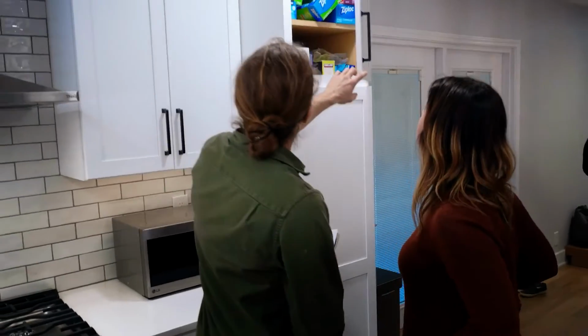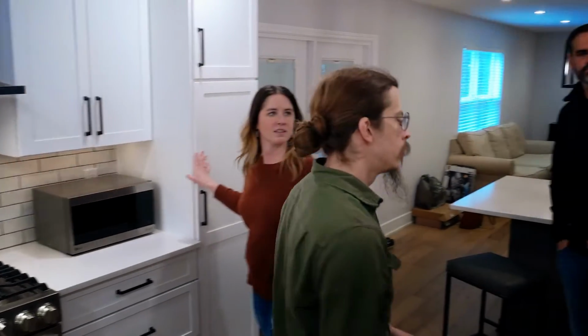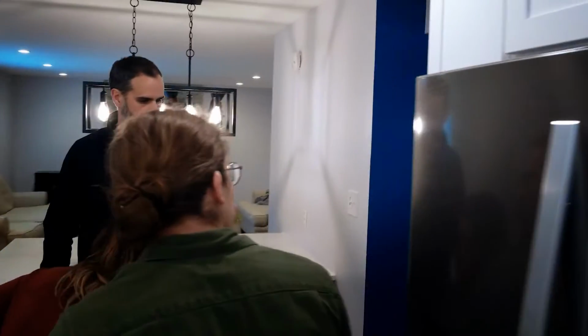Yeah, there's always, like, adjusting cabinet doors is the perennial example of that. Right. It's like these 2 doors don't line up, and they've been that way for a couple of weeks. It's always on our punch list to get that done. Yeah. And the whole idea is that we send a guy out here and he has this whole list of things to do instead of driving across town to do this one little thing. Yeah, so, absolutely. A little bit more formal of a way of getting that information totally complete.